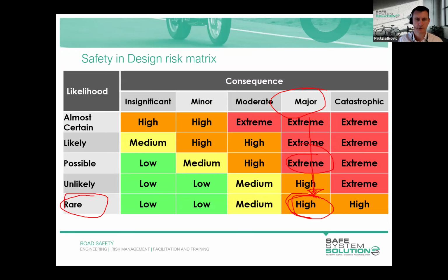We've got to ask ourselves: is there anything more that can be done to further minimise or even eliminate that risk? Remember, when we're talking about traffic, we might be thinking about diversions. That would eliminate risk, but we've got to consider whether that's reasonably practical, and whether that mitigation is suitable for the location that we are considering.